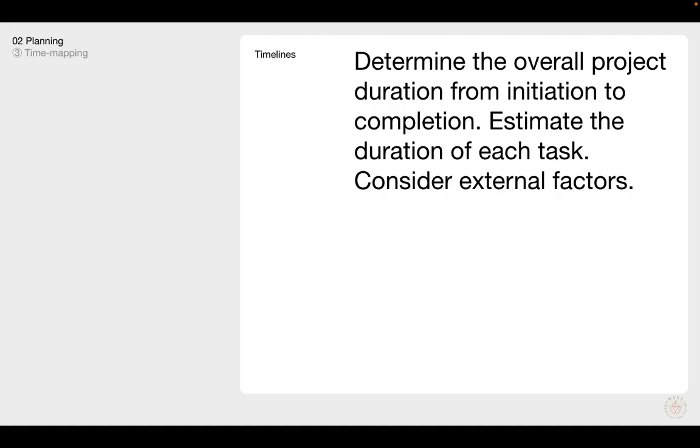So really making sure that your timelines aren't cutting too close and that you're planning them with a buffer in mind. So maybe I would suggest keeping that timeline to have Zoom on the computer for the event 3 days before the event, or maybe 4 or 5 days before the event. So yeah, a buffer time is really important to just make sure that any unexpected delays or issues can also not hamper your final outcome.